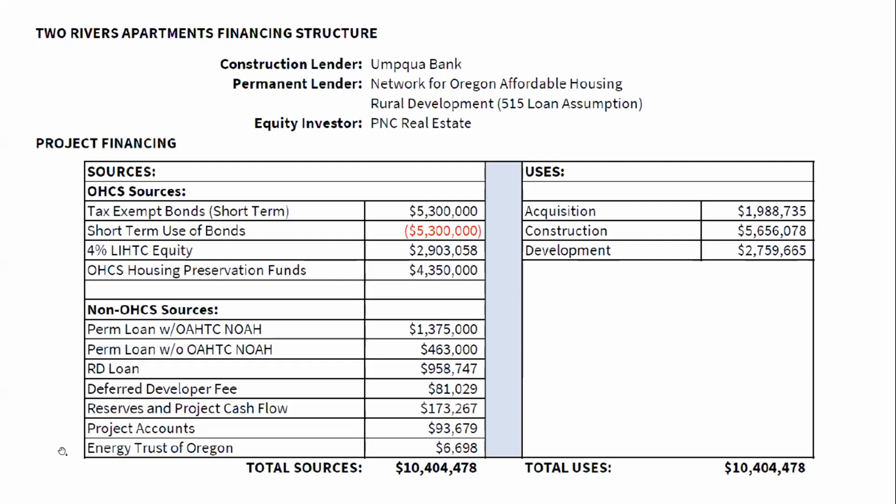As an example, we did 4 separate properties in 2007, and the rehabilitation on those was like $9,000 a unit, and this is like $97,000 a unit. So now we're at the point where we're looking at, hopefully through the Oregon Affordable Housing Tax Credit NOFA, to do some recapitalization on those projects, because that wasn't sustainable.